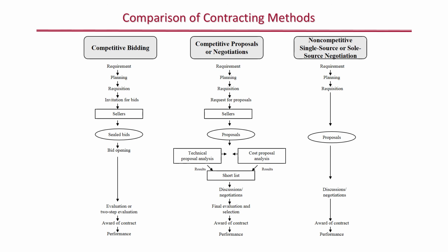So again, that's the key takeaway for me when I compare the difference between an IFB and an RFP. With an IFB, your requirements are generally known, you have firm specifications or requirements, and you're essentially asking for a price for those requirements. When you think about an RFP, you know your objectives, you have an idea of your deliverables, but you're asking the sellers to provide different ways to achieve or fulfill those objectives.